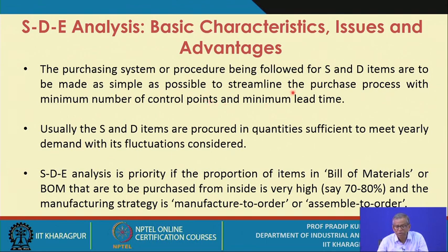Now, what do you try to do? While you streamline the purchase process, make sure that there are a minimum number of control points and minimum lead time. That means the procurement lead time should be as minimum as possible for the scarce and difficult to procure items. Now this is very challenging in the majority of cases.